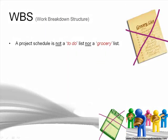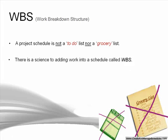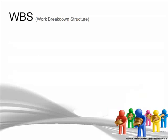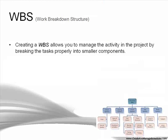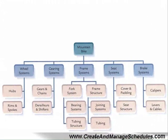A project schedule is not a to-do list or a grocery list. There's a science to adding work into the schedule called the work breakdown structure. Learn the WBS and you'll be able to quickly create and manage your project schedules. Creating a WBS allows you to manage the activity in the project by breaking it into tasks that are properly defined.